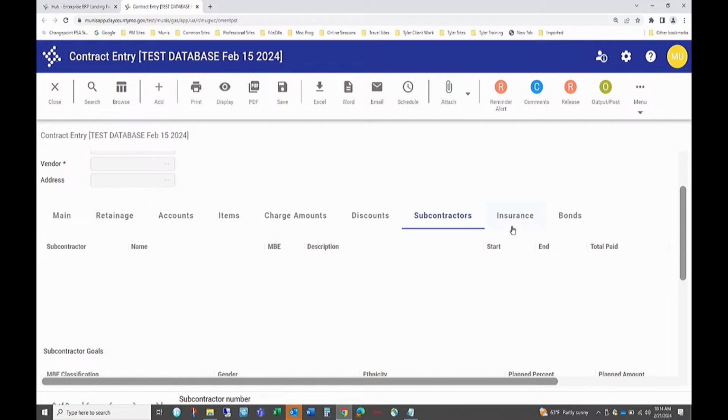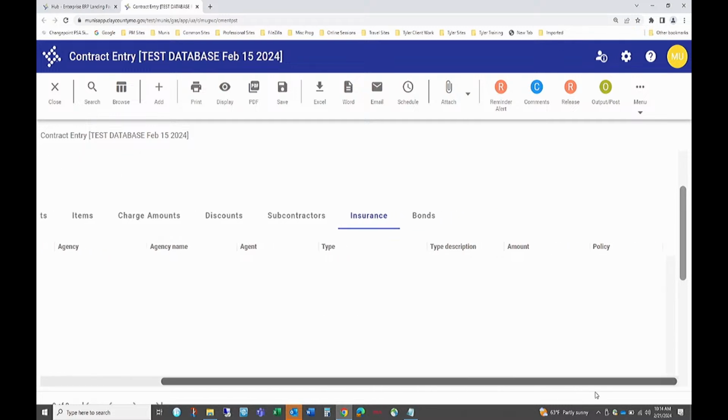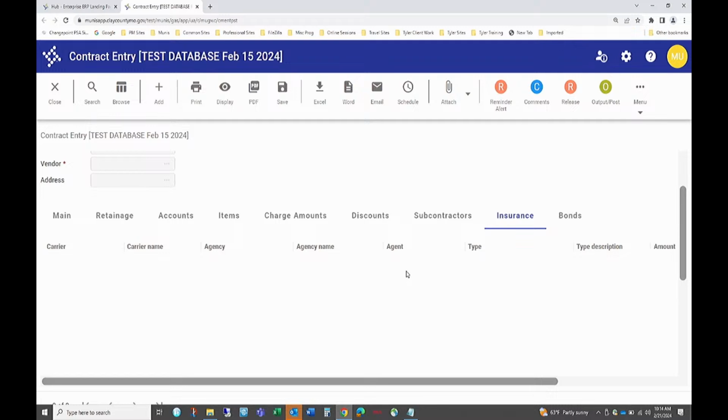You can track your insurance certificates. You put them in here, and it's not showing it all, but there's a way with the email on the vendors that you're adding in here, with the insurance, that at 30, 60, 90 days and expiration date, the vendors would get an email saying, hey, we've got this insurance certificate, it's 90 days from expiration, can you send us a new one? Haven't gotten it, 60 days out, sends them another one, 30 days, and then the date of expiration, so you're in violation of your contract, we don't have a renewed insurance, workers' comp, whatever it is.